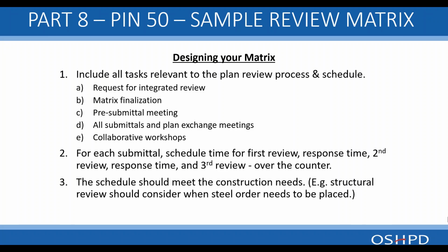That includes request for integrated review, matrix finalization, pre-submittal meeting, all submittals and plan exchange meetings, and all collaborative workshops. These should all be specified as tasks on your matrix.